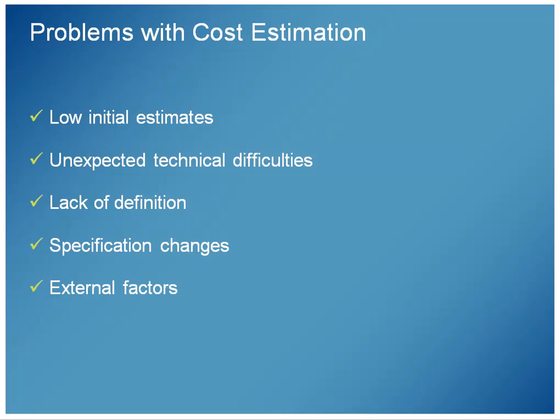First of all, if the functionality was in the original specifications, the budget probably would have been higher. Second, it actually costs more to add new features once the specifications are out there and project development has started than it does to have that feature in the original specifications, because in the original specifications it's factored in. As you add it in later, you've got to kind of work it in, and it ends up becoming extra work. So a lot of software companies will charge significantly for new features beyond the specifications, and they will encourage the client to spell out exactly what it is they want before the product gets created.